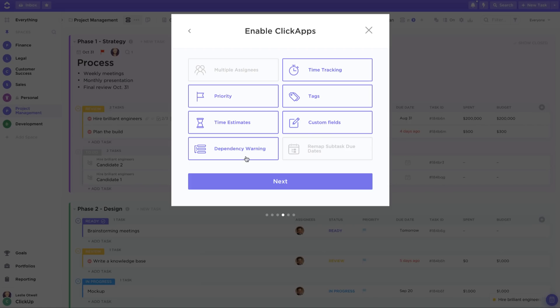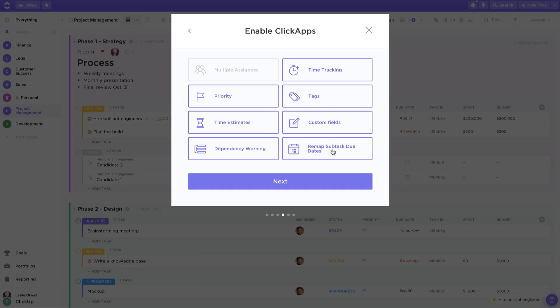With the Dependency Warning ClickApp, ClickUp will give you a little pop-up warning if you try to close a dependent task in the incorrect order. With Remap Subtask Due Dates enabled, when you change a parent task's due date, we'll ask you if you want us to automatically change its subtask due dates by the same amount.